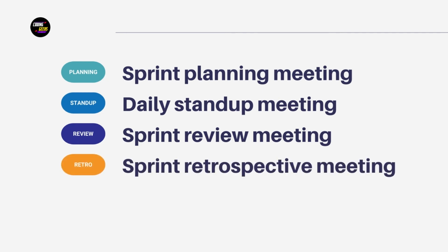Just like review meetings, a sprint retrospective meeting is held at the end of each sprint, whereas review meetings include the product owner and other stakeholders. Retrospective meetings are primarily for the benefit of your Scrum team. There is usually no need to get outside players involved. During a sprint retrospective meeting, address these questions with your Scrum team. What went right? What went wrong? And what could we do differently next time?